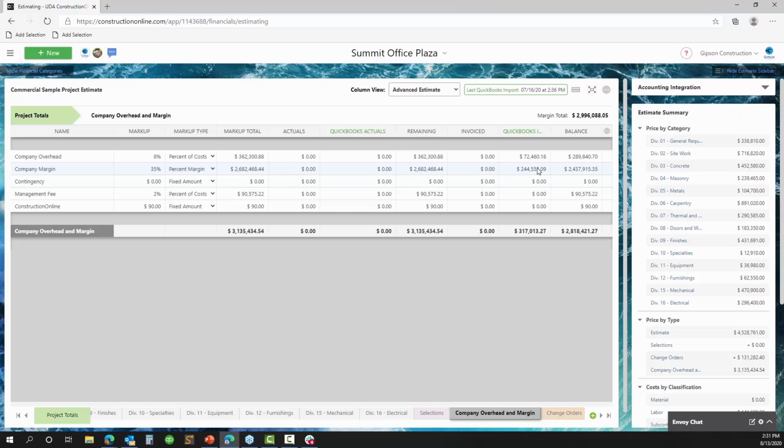I think the simplest, Holly, is to say, look, you want 35% of this project contract to be allocated to profit. Here's the number. This is going to be 35% of the project total price allocated towards your profit margin. Now, of course, you don't show that inside of a proposal. Typically, at this scale, you wouldn't actually show that information, but you could if you wanted to. But we have a lot of options to build that profit margin back into or prorate it throughout the contract proposal. This tool alone can save so much time in trying to calculate and really ensure that you're building the proper amount of profitability into your projects.